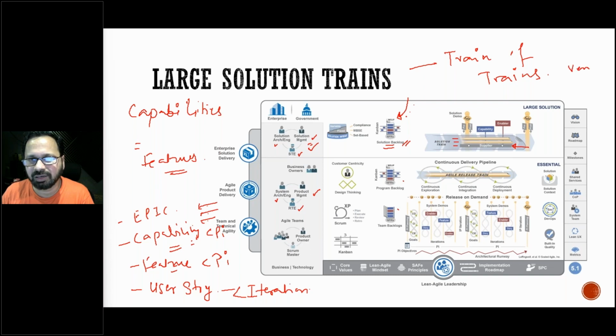an external vendor who could also be working in an ART to deliver and integrate value together, right? Maybe we have outsourced some work to some companies. Here there are service companies like Infosys, TCS, Wipro, Capgemini, right? We may have a supplier ART sitting here on their own, like an offshore development center, and there is ART number one, ART number two, ART number three, and everybody does their PI, but they connect with their pre-PI and post-PI to sync up. They coordinate for a common backlog, and they split whatever features are required, and they end up delivering the overall solution.